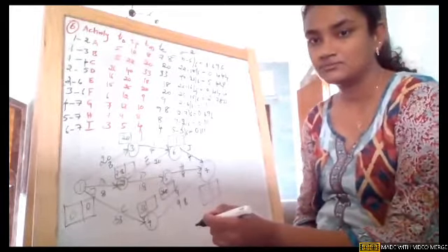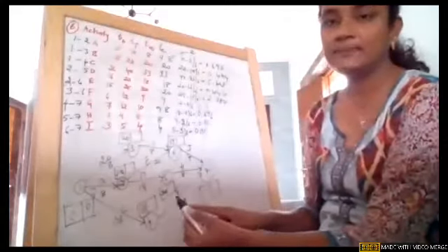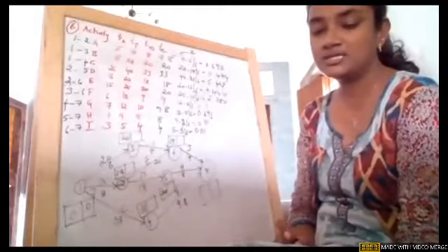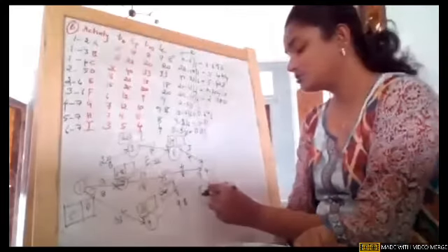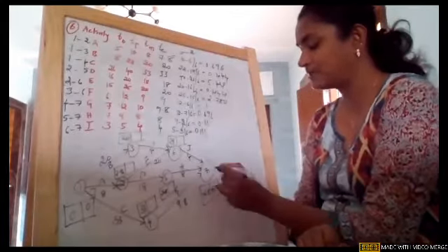Then come to node 7. On node 7 you see 29 plus 4, which is one arrowhead, giving 33. 25.8 plus 8, which is 33.8, and one is 33 plus 9.8, which is 42.8. So the duration of the project is 42.8, the maximum arrowhead duration.